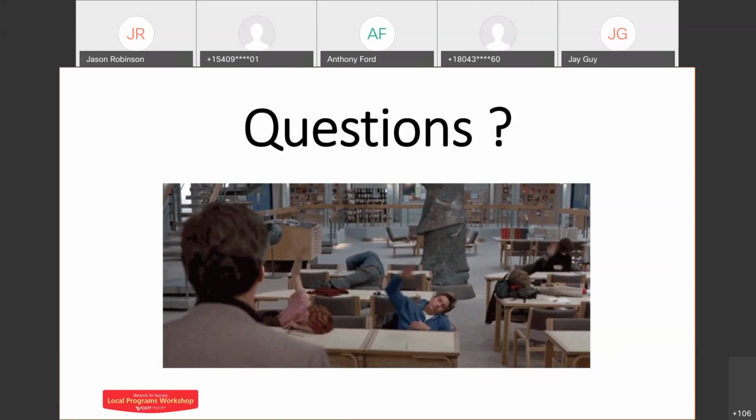Michaela, I can tell Tamara Ambler, the Staunton District Environmental Manager, makes a good point about mixing federal funds and state funds on a corridor by separating out projects. If you get into that situation, don't forget you may be federalizing the entire corridor, so we may need to do a NEPA document on the whole corridor, even though we carve out state-funded portions. There are details that we didn't get into today that affect those sorts of things. But just work closely with VDOT and we can help work through those sorts of issues.